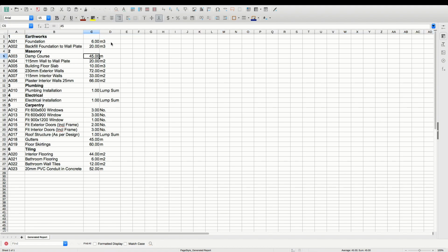So as a first step, when cleaning up your bill of quantities, make sure to delete all of those lines that you don't want to see inside of your bill of quantities. Okay, so in this case, you'll see that earthworks will appear as a comment. But in actual fact, earthworks is a section or a heading, and we want to see a roll up against the section, and we want to see a section total against this. So we don't want this line to just show up as a comment.